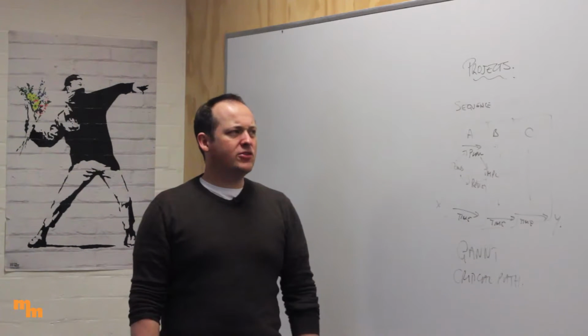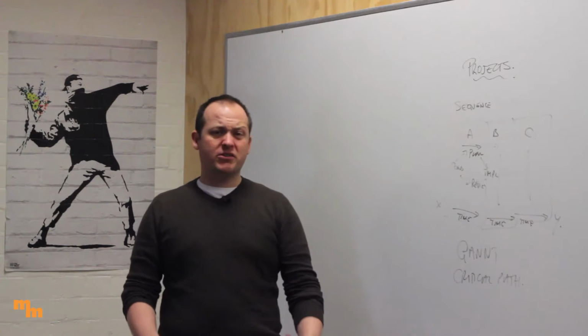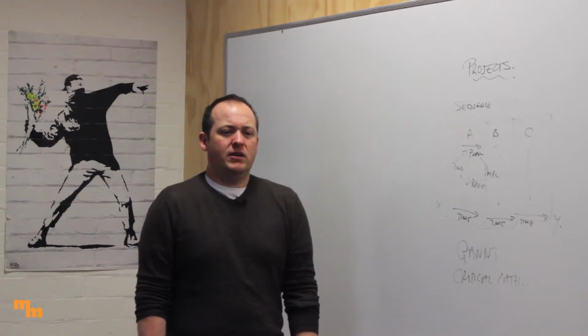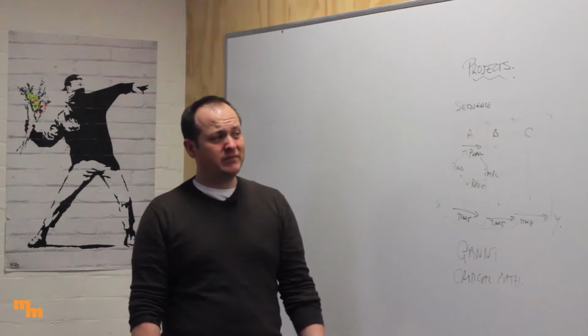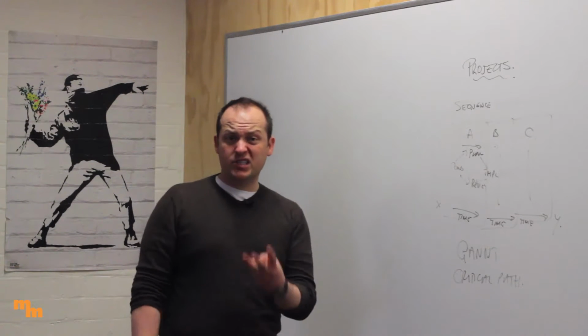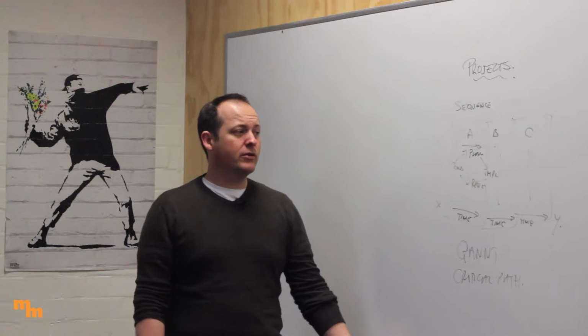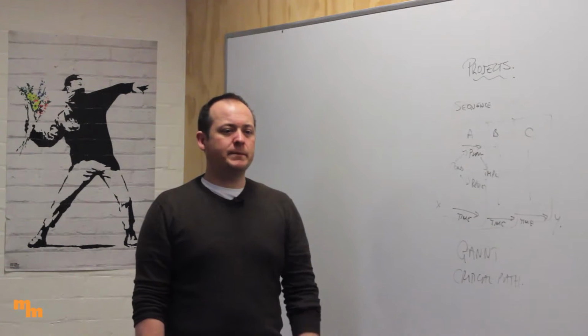Think about also the lead time. So before you can even begin the activity, is there a time that needs to go by? Your lead time, it could be anything. I need to order something from the supplier. Well, those suppliers aren't going to get here for at least 3 weeks, so you're not doing anything until they do. Little questions like that.